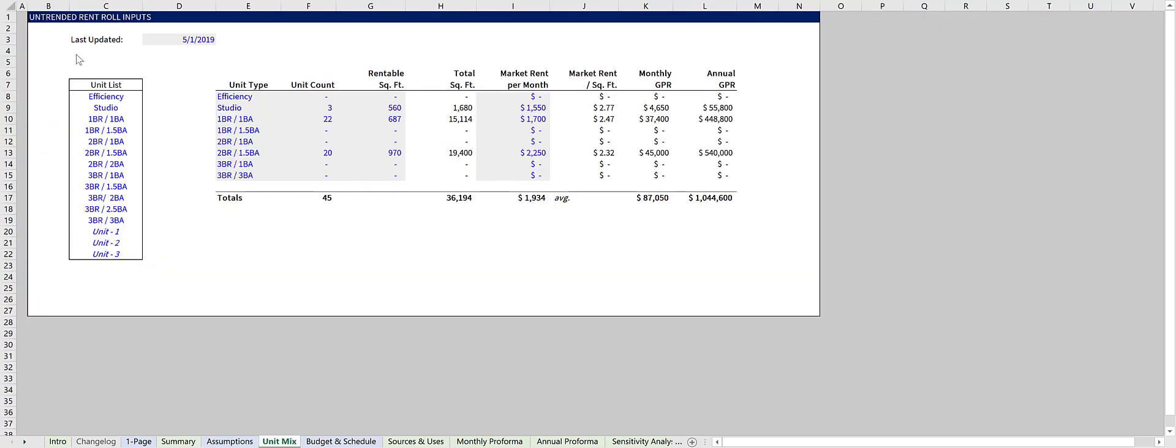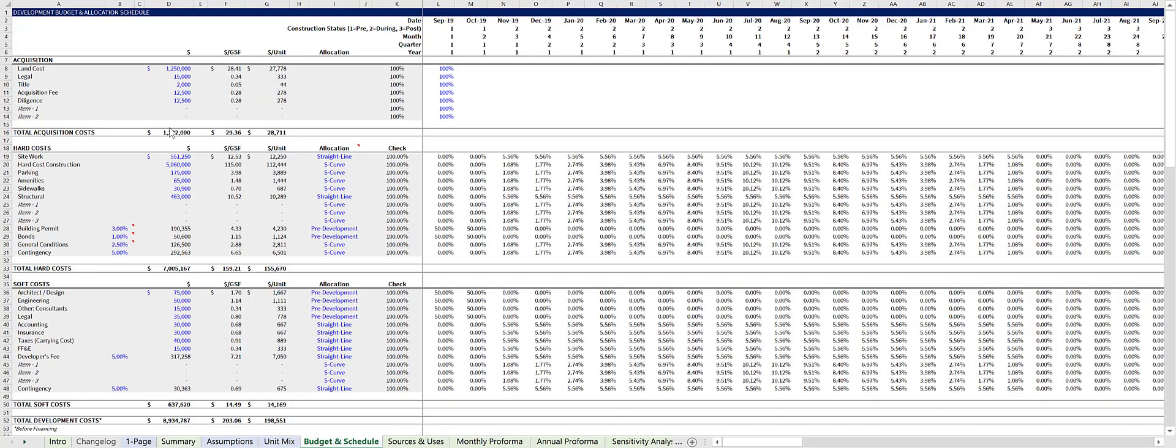The unit mix tab is straightforward. You input your project unit mix, and it feeds into the rest of the model. In the budget and schedule tab, you'll input your budget and choose the allocation schedules for each respective budget item. Choose the allocation by using a drop-down list in column I, over here.